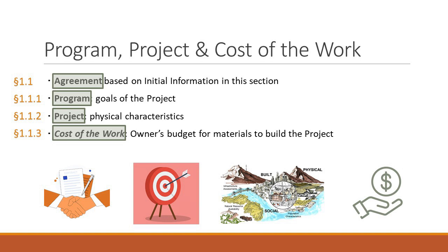It has nothing to do with the amount that you as the architect are going to be paid. So it's only as far as the cost that the contractor is being paid to buy the materials and perform the labor. And that's the reason why it's important and why I have it highlighted here, because we're talking about the budget in Section 6.1, which we're not going to get to today, but we'll talk about it. Article 6 has various owner's considerations, including its budget.